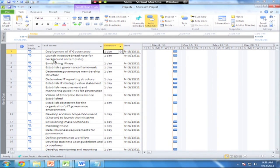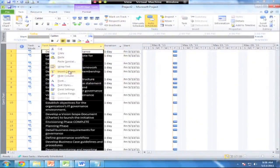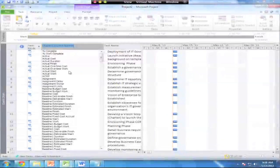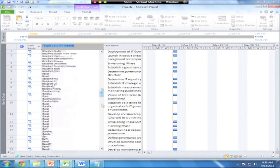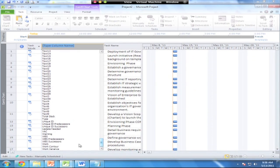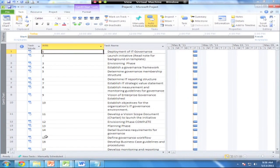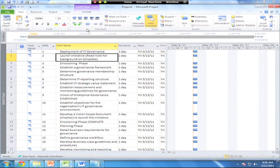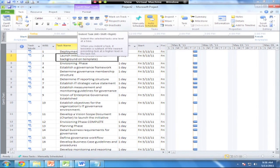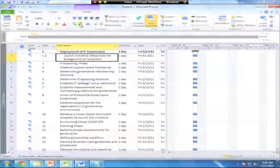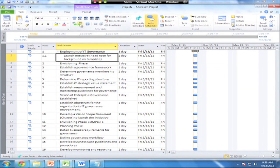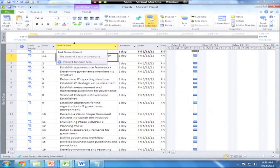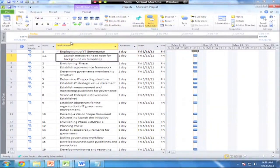We're going to do a few things to try and tie these together. First, we're going to work with the work breakdown structure idea. Let's add in a WBS column here. I'm going to insert a new column into my project file, so insert WBS. I've got a WBS column. These are preset fields that are already built into Microsoft Project. The reason I add this in there is so you can see that as I now work with the indent and outdent buttons, this basically treats it like an outline.